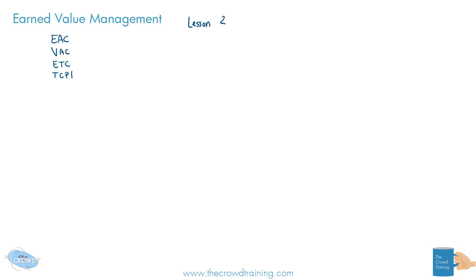Now, if you recall in the first lesson, we had this project that was about 10 days. The project would move up with the plan value having different increments of what we plan to earn over the length of the project. The total budget at completion, if we took this cost baseline and spread it from point A to point B at the end, would have a total budget or expected budget of about $230. This was a very simple project we were using to illustrate this.